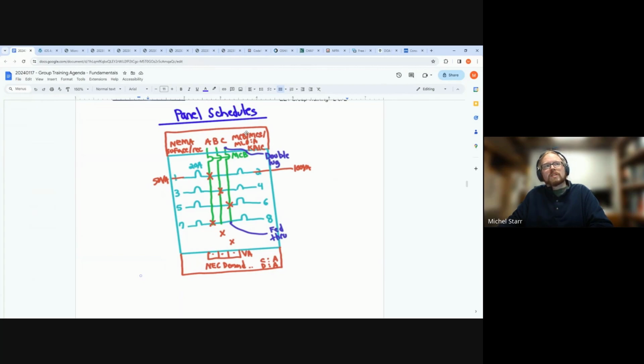At the top, there's just normally listings of the equipment ratings, and to the note of what the contractor is looking at, if that is a cookie cutter generic approach, or I've done several of these buildings and that's how they're qualified to do it whenever they were trying to win the work, potentially. They've had this before or designed these before. It is to make sure to look for where the dollars and cents are, the ones that you don't want to miss, because if you miss, it's expensive or it's a long lead time. So things like the KAIC rating,